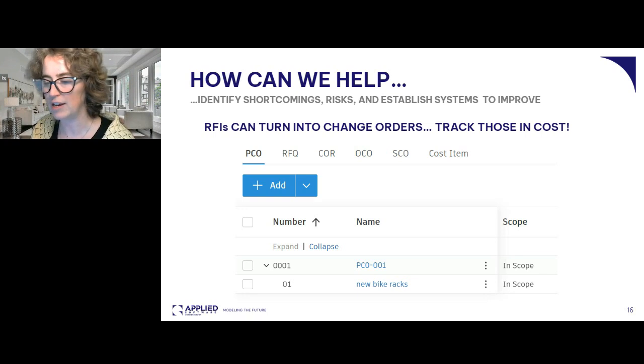If you're using it, you can use a request for quotation that goes downstream to your suppliers, your subcontractors. You've got your change order request, which goes upstream to owners, or contractors, whoever's above you in that system, and we get everybody's approval. We submit all kinds of costs with that, and everybody gets it approved. And then we go out for the official, okay, here's the owner change order, here's the supplier change order, make this official, let's get this done, and let's track all of this.